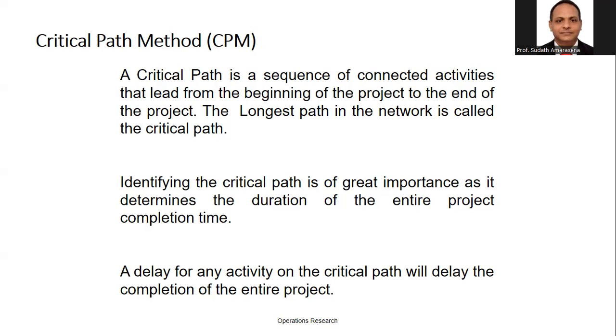You know, a project includes a lot of activities, and in any project we can see the events as well. One starting point, one finishing point. Based on one particular event, we can start so many activities, but we can't complete all of them using the same event. However, we need to consider that isolated activities are not allowed, and we need to draw the entire project in the forward process, backward not allowed. All the arrows use straight lines, cross arrows not allowed. Likewise, I explained the most important rules. Then today we can go to the CPM method.